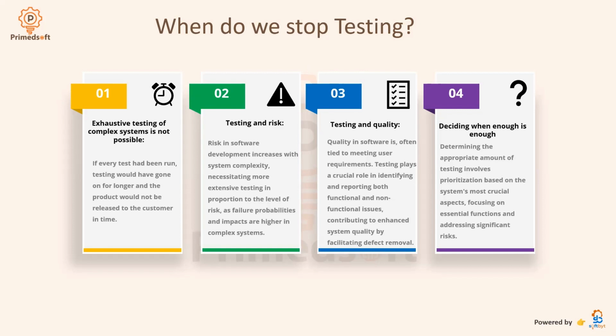And then the due date, the delivery date is very close, right? We've gotten to the day that the application should go live, right? And then we've reported to the stakeholder, this is where we are, this is what is still remaining. I've raised my bugs, I've documented it, I've sent a report, right? And then they looked at it and they were like, okay, 1, 2, 3, it's fine, we can go live. It's not a showstopper. 2, 4, we need to fix it before we go live. So they chose the ones they want to fix.